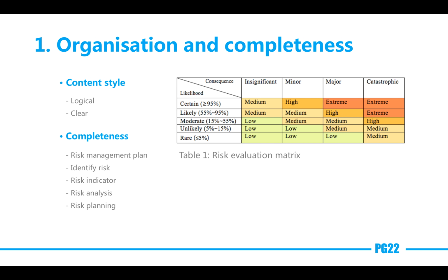In section 5.1, Plan Risk Management, it clearly defined the tool to evaluate the risk. A risk level matrix is firstly shown to tell the customer how the consequence level is evaluated. Then, the risk evaluation matrix is clearly explained. The risk level in the matrix is distinguished by different colors. It is easier for the customer to know the risk level of each risk.